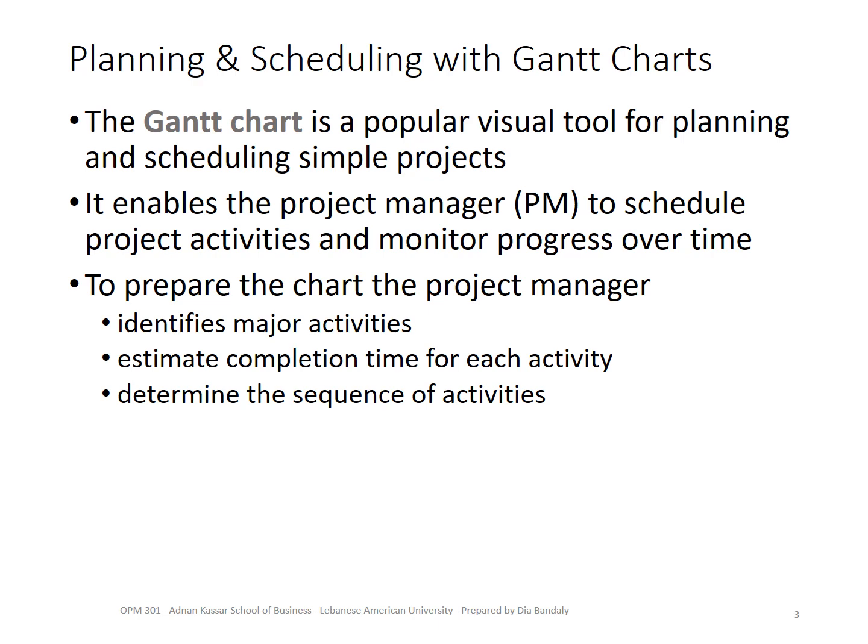It's very important. But to prepare the chart, you first need to identify the activities, and we said that you do that using the WBS. But you also need to know the completion time, so you know the duration of each activity, and this comes with experience. In our course, of course, you're not responsible for that; the durations of the activities will be given to us. But in real life it needs experience to come up with a completion time or duration for all the activities. And then you need to decide on the sequence of activities.